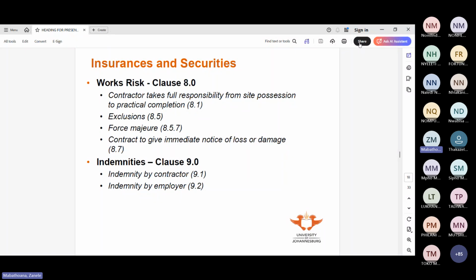The contractor says, oh no, that will cost about, let's say, 32,000 to do the plinth. And the relocation of the mini sub will be this amount of money, right? So they will disconnect and do the coring so that the wires move. However, then we realized that where we're putting the mini sub is right in front of a fire hydrant. So we need to change the location of the plinth. At this point, the contractor has not built the plinth. From the plan, the engineer will just issue a side instruction to say, instead of having the plinth and the mini sub here, please move them to this point.